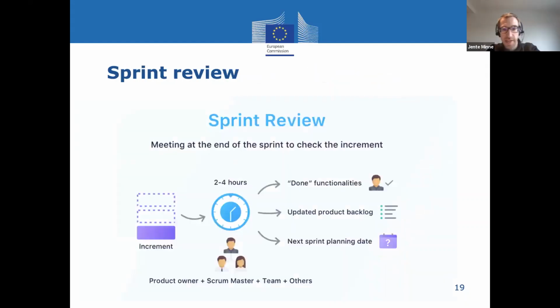If we go to the next slide, the sprint review, it's after the 2 or 3 weeks that you've been working on a sprint. You let the people that worked on it, your implementing group, present what they've done. And they will present all the features that they've been working on. And so you also give them the stage, you give them the pride in what they worked on. At the same time, you have a good overview of what has been done during this sprint, during these 2 or 3 weeks of development.